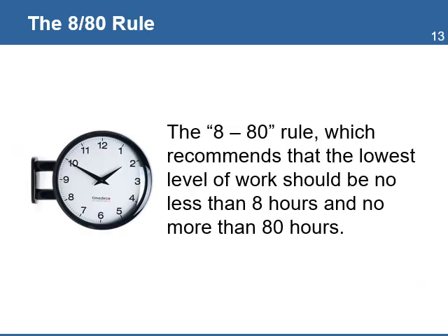Another important rule of the WBS is the 8/80 rule. This rule states that the duration of any activity should not take more than 80 hours, nor less than 8 hours to finish. The purpose of this rule is to keep the size and detail of the WBS at a manageable level. Adding tasks that are less than 8 hours can increase the time and effort to manage the project scope. Adding activities that are more than 80 hours long can hide important details in the activity that can create risk to the project if they are not properly monitored. If an activity is greater than 80 hours, then you need to decompose it further into lower level work packages.